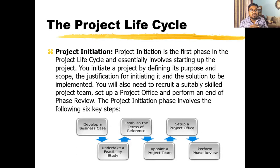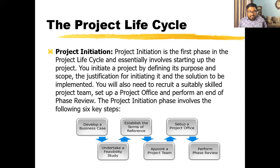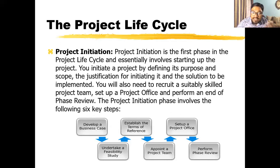In the project initiation phase, you identify problems — this is called the business case. Then you undertake a feasibility study to determine whether your idea is really feasible to transform into a good project. Then you establish the terms and references — the terms and conditions for taking on the project. Next, you appoint a project team, set up a project office, and perform a phase review. In summary, this is the idea stage where you convert your idea into a project.